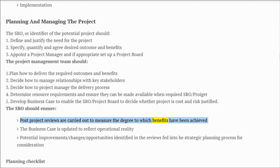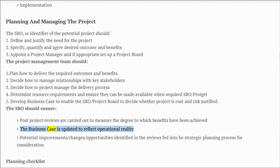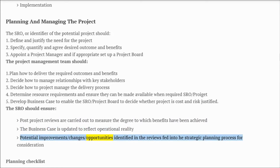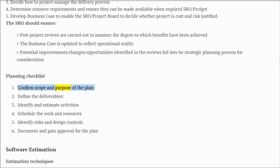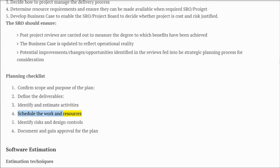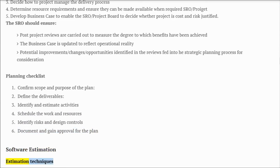The SRO should ensure post-project reviews are carried out to measure the degree to which benefits have been achieved, and the business case is updated to reflect operational reality. Potential improvements and opportunities identified in reviews are fed into the strategic planning process. Planning checklist: confirm scope and purpose of the plan, define the deliverables, identify and estimate activities, schedule the work and resources, identify risks and design controls, document and gain approval for the plan.